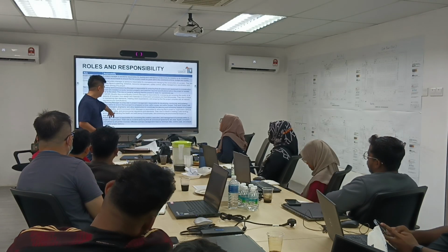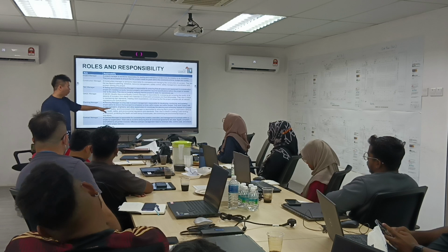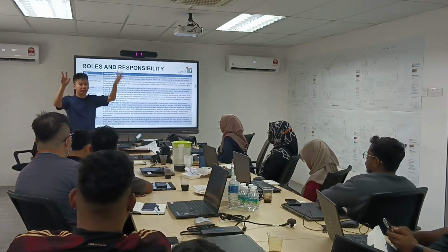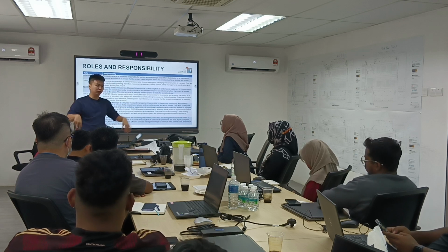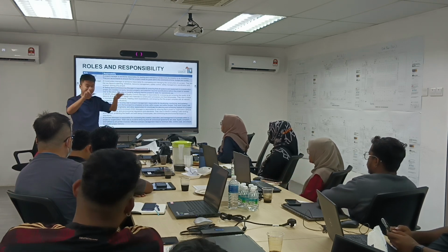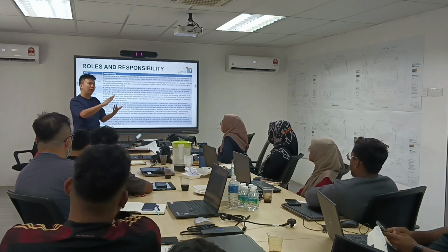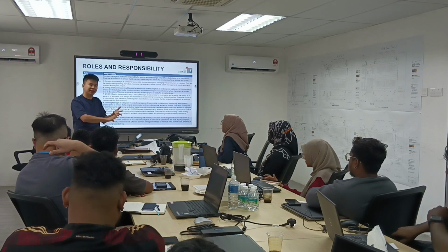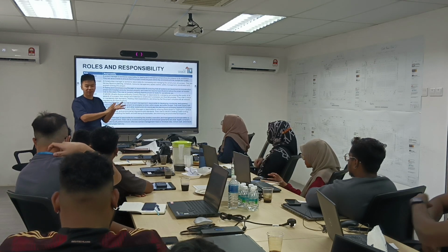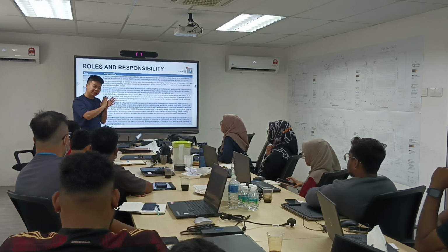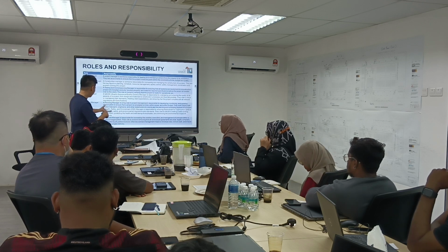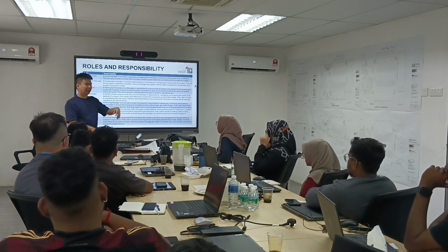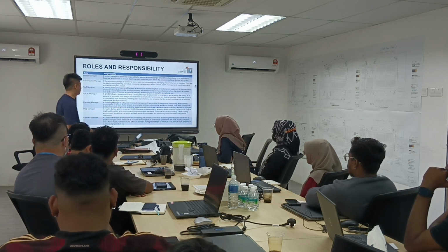The contract guy. So this guy is actually overseeing the whole contract management. Each and every vendor in our project has a contract. They cannot run naked, they must have a contract. The contract is the framework to identify the job scope, what you need to provide, what specification you need, when the end date of the project is, and what the consequences are if you do not perform in the project. All these things are included. I'm not sure how many of you actually read the contract. Actually, the contract is also in our servers, so later I will also show you where to find the contracts.